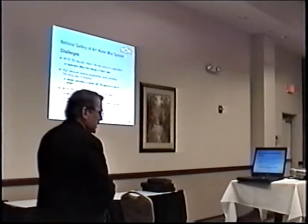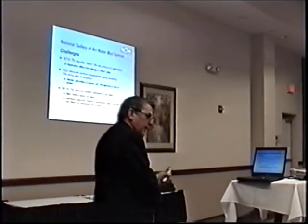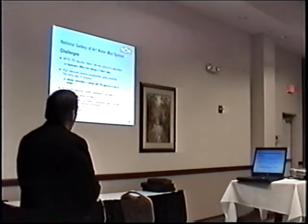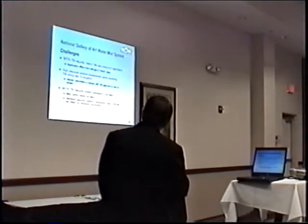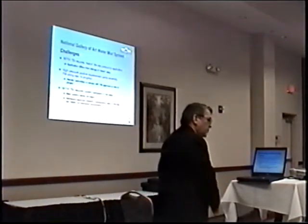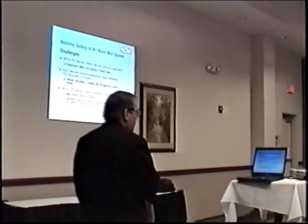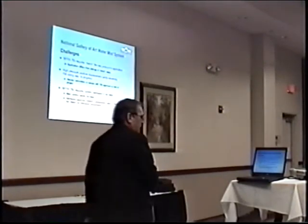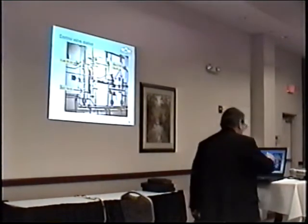The part that was at their expense, they balked at that. But as it turned out, their controller did not get approved. And we ended up taking that controller out and installing a much different, absolutely different controller. Anyway, so that was a challenge through the process. And right to I think it was March 16th, this last few weeks, we finally commissioned the new pump controller. Things like main control valves, those deluge valves, are listed under IMO for certain applications, but not as pre-action valves, and they're not part of the FM approval. So there's all kinds of little things that don't fit perfectly in the box.